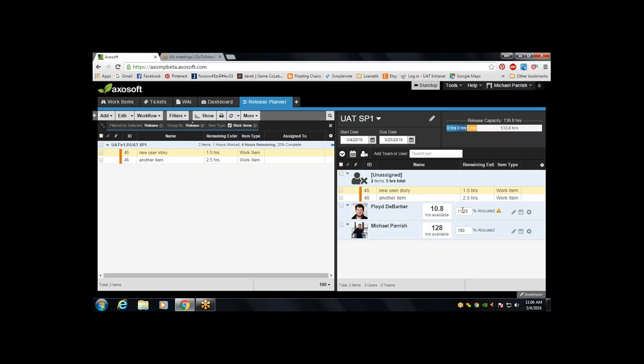This is where this percentage allocated comes into play. We just recently added this in. If you're a part of multiple products, which is very, very feasible, if you're really a high-end UI, UX guy or whatever, you may be doing that for three games or whatever the case. Then we need to identify how much, from a percentage perspective, you're working on game one versus game two versus game three. It will then take that over that window of time and tell them you've got 15 hours available this week because you're on two other sprints going on right now, and that's all we can give you. So for you guys, it's less of a concern because you're probably working on just the one product that you have.